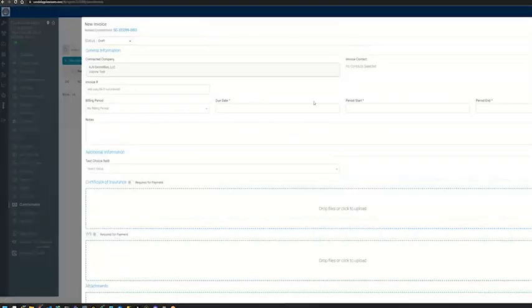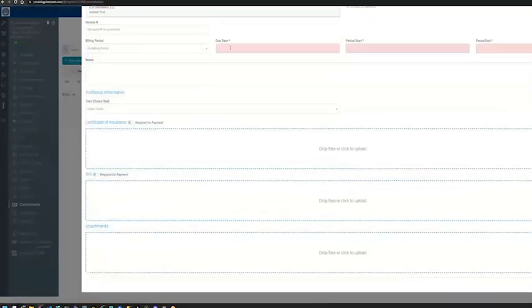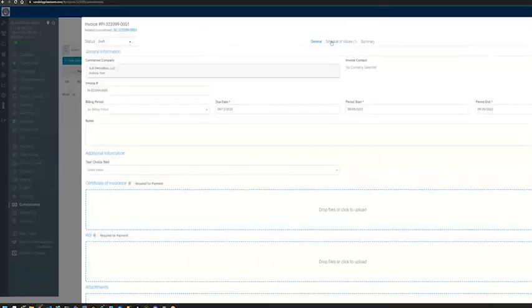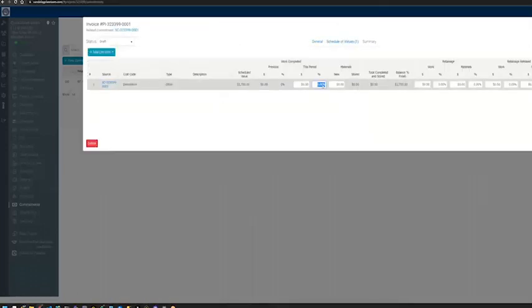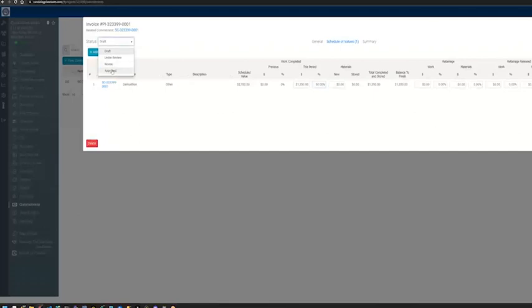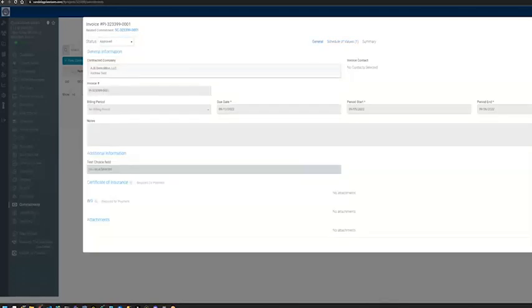I'm in here. I'm going to go create a new invoice. I'm going to be billed 50%. I'm approving a bill from my subcontractor for 50% of the contracted value. And then I can synchronize this to the ERP system. Once you have this invoice synchronized, I can view it in the ERP just like I can every other item.